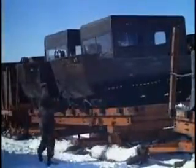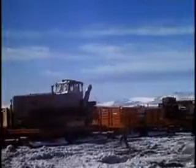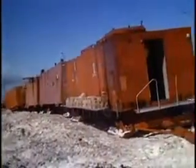Even the vehicles we used at the site had to be transported over the ice on big bobsleds. We called these convoys of 10 and 20-ton sleds heavy swings. Crawling up the ice cap at approximately 2 miles an hour, a heavy swing would reach the camp in about 70 hours if everything went well.